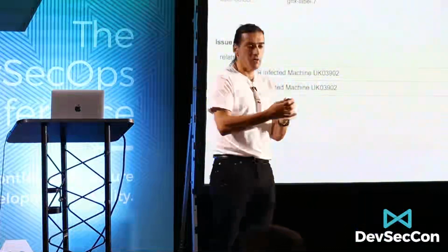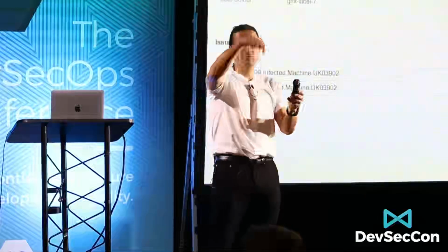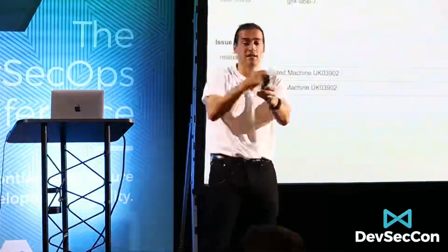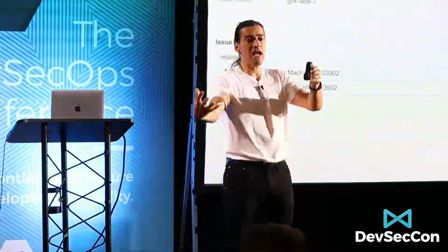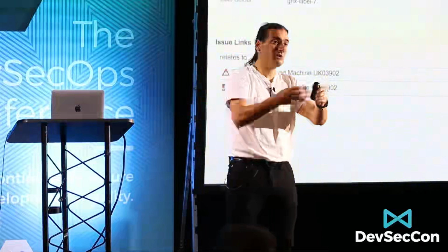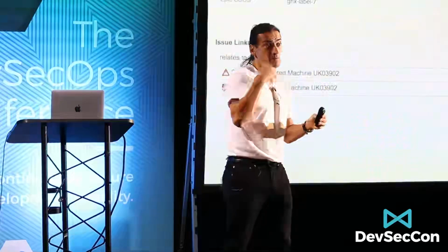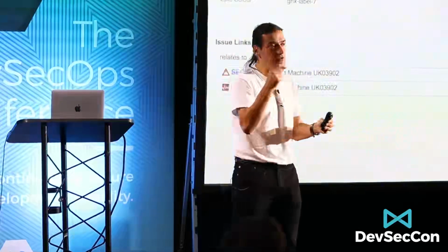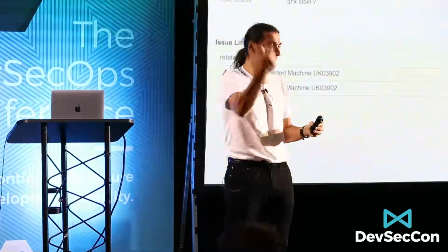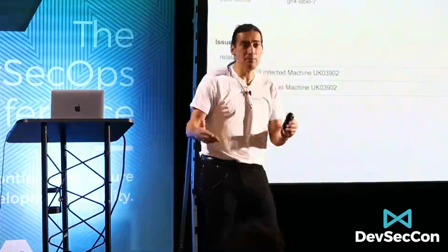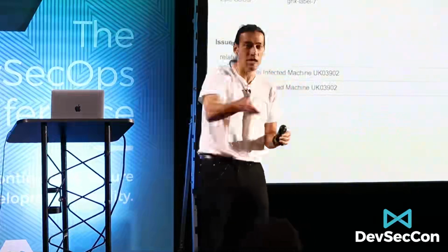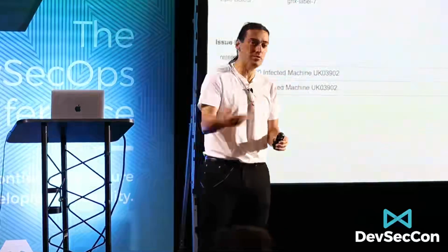Now, the point of doing this is, and that's the power of a graph, right? We got to the point where we have one incident which spins off the epic, which tracks that, and they will create literally 20 tasks that come out of it. The thing about this is, you will all do it. The problem is you haven't normalized those tasks. They will be on somebody's head, right? And then it's a problem because you go, have you done this? Have you done this? Where are you? Where's the status, etc. It becomes a nightmare to maintain.